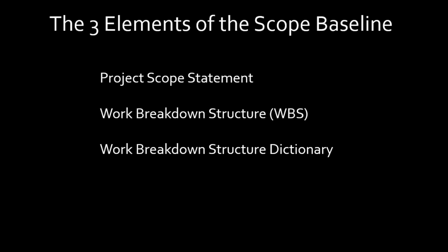It's the work breakdown structure dictionary. I know I showed you a work breakdown structure before. It looks like a pyramid and it also takes on other forms. But I show it in pyramid because it makes the most sense teaching it that way. But think about in each one of those boxes, all the information I might want to know about each and every one of the elements. Just too much. I couldn't get it all in there. So therefore I create a side document, the work breakdown structure dictionary, which is complementary to the work breakdown structure itself. So these three elements constitute the scope baseline.